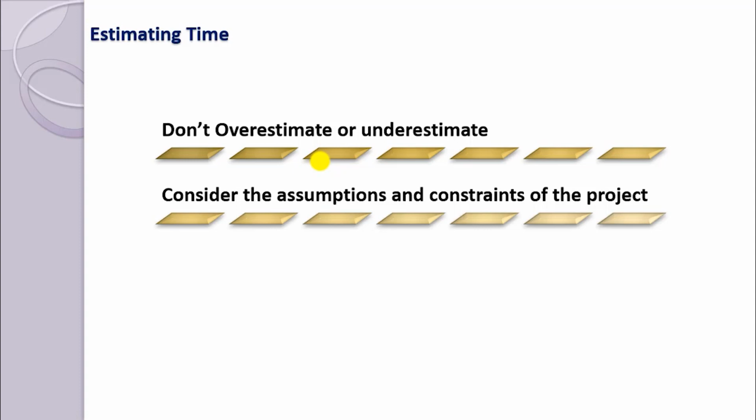The key rule to remember when estimating time is this: the person who will actually undertake a given piece of work should create the estimates. Again, this situation and circumstance is all dependent on which project you are being given or which project you are going to handle. It can happen that when you are handling a new development, you have to build a team. At that time, you don't have a resource, you don't have a team, then how will you go about it?